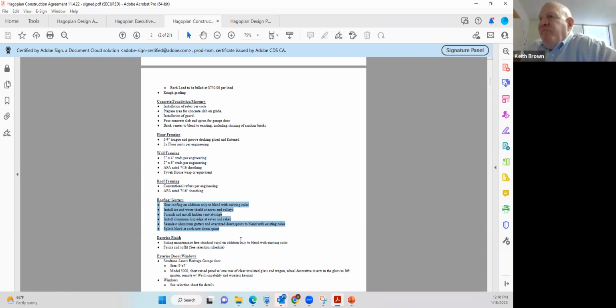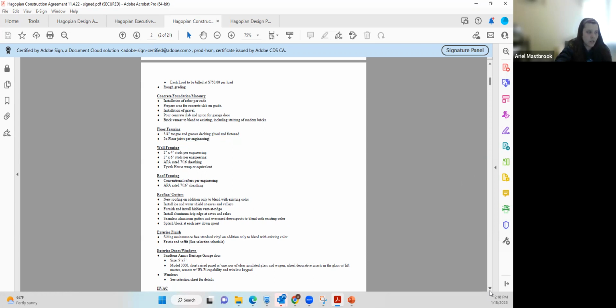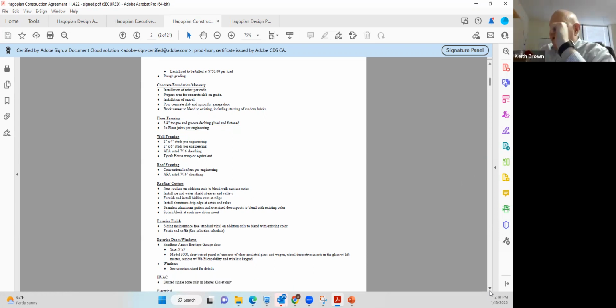It's kind of more like, for instance, for this section here, this is part of the template. And I just look at the estimate and see, okay, I see there's 2 buys in there. So I'm going to leave that in there. So it's a lot of cross-checking between the trade quotes, the estimate, and the selection sheet in order to come up with this document.